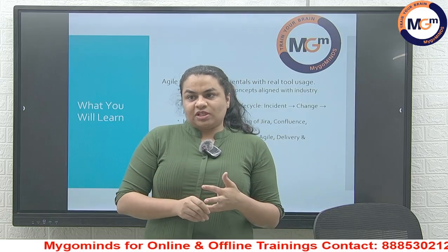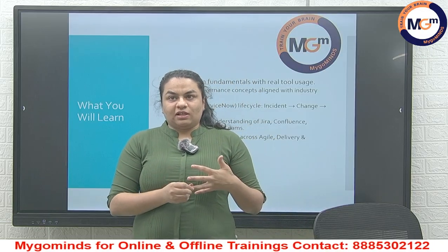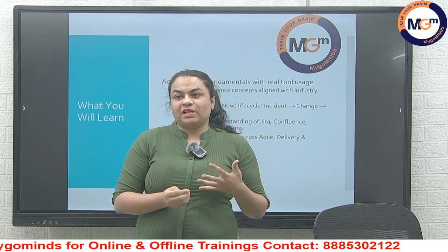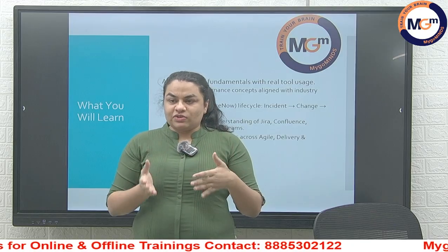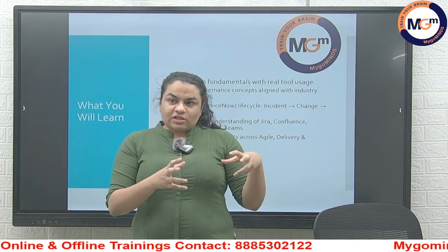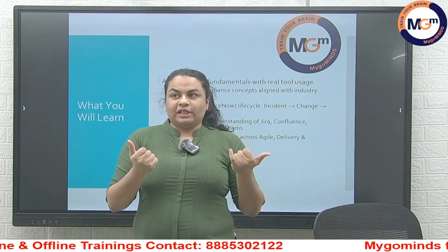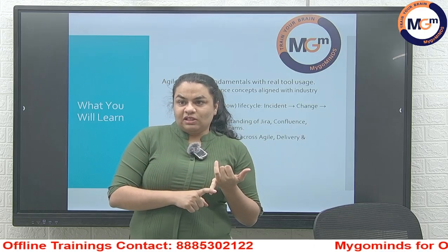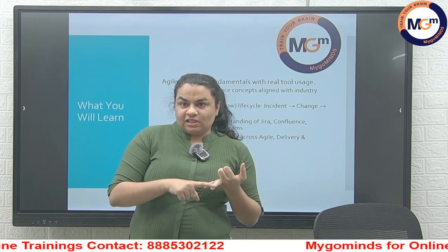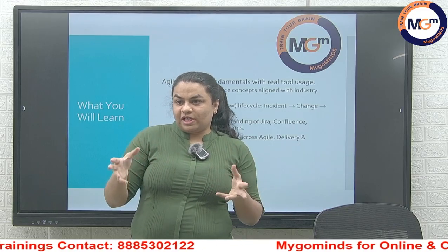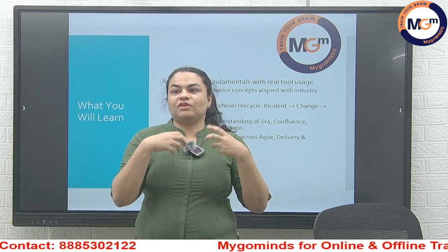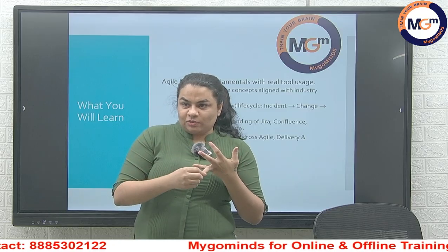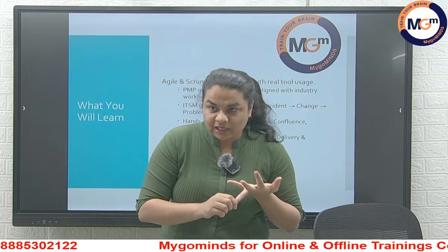User stories are a major part. Like I said, if it is a food delivery app, let's say live tracking will be one feature. We're going to write the user story for it. For users, for live tracking, what are we going to need? Live tracking mode, and every 30 seconds there is supposed to be an update from the rider on where exactly he is, and how it's going to respond. There should be a responsive API as well.